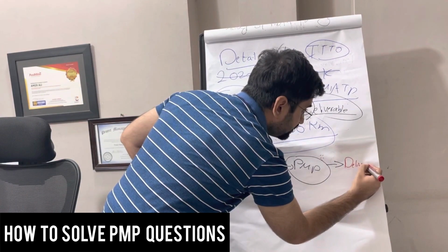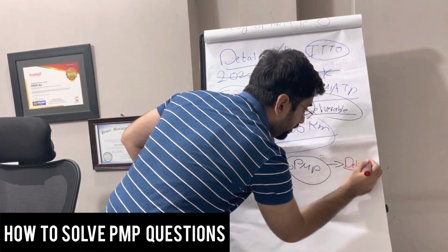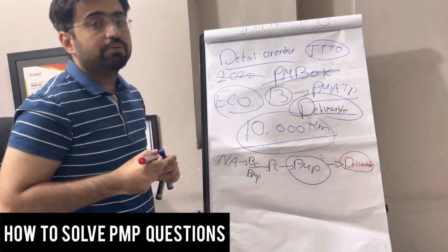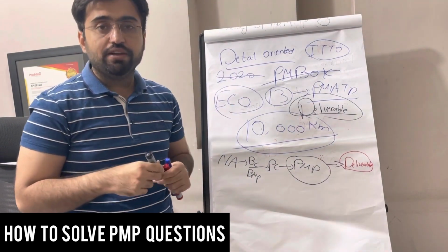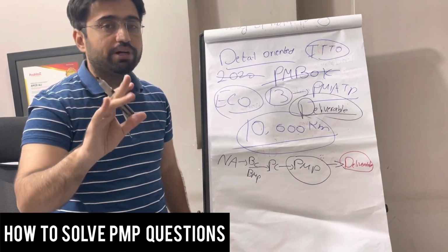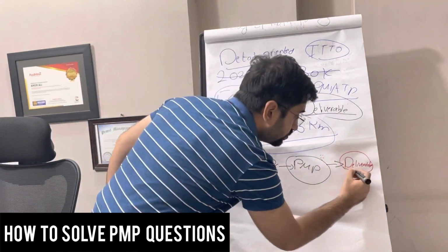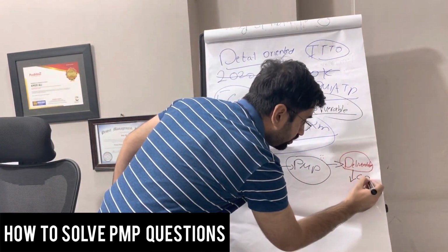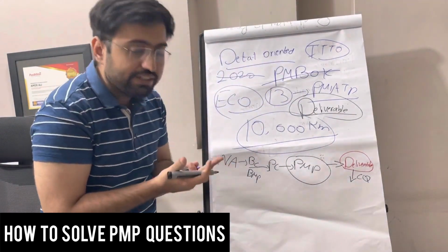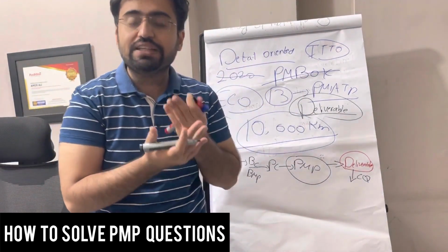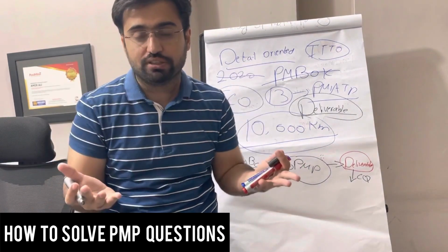And deliverables are being produced. While they are being produced, manage quality ensures they are the right deliverables. Once the deliverables are produced, they directly go to control quality, and now the deliverables will be inspected whether they meet the agreed standard or not.